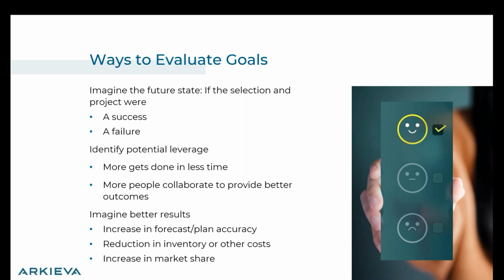Well, then those things can become your goals because then now you know the types of things you absolutely want to do. Similarly, you can do it in reverse. You can go out into the future, again, hypothetically, just mentally, and you are asking the question, what if my project is a failure? What are the types of mistakes I would have done to make this into a failure? And then you want to mitigate those or avoid those mistakes potentially.